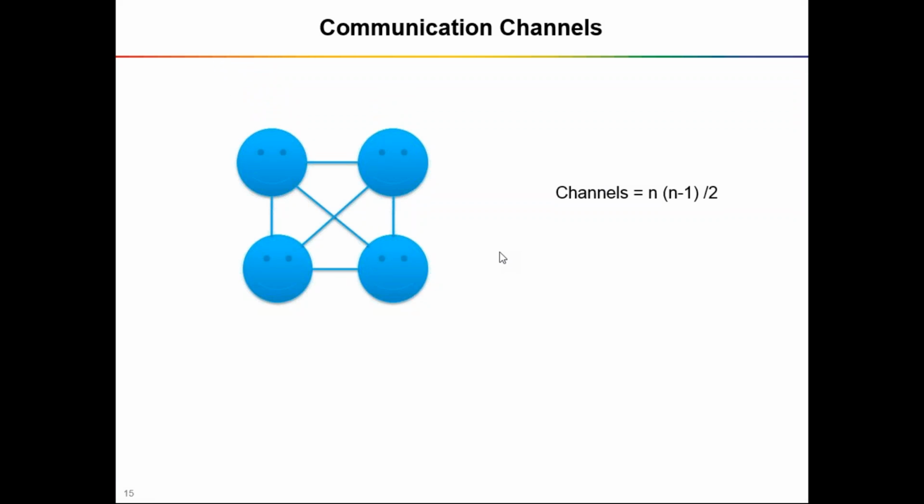This example is just for the 4 stakeholders, and generally, whenever you are assuming any project, you have to assume a project of at least 500 stakeholders in it. And another thing is we get a lot of questions in PMP for this simple calculation, where they will be giving, there's a team of 5 people managed by a project manager, how many communication channels will be there, or there's a team of 5 people, one more person is added, so how many new communication channels are getting added. So you just have to understand this small formula and go ahead and score in all those questions. Okay, so this was our first